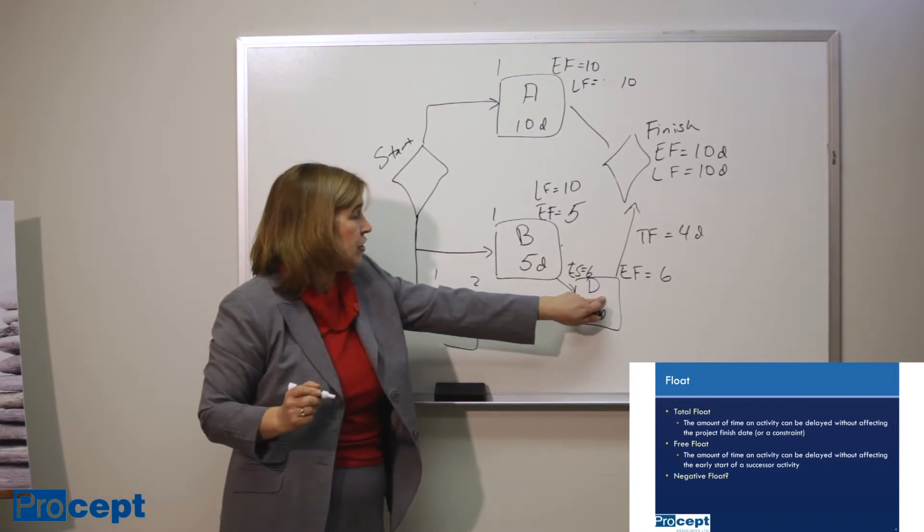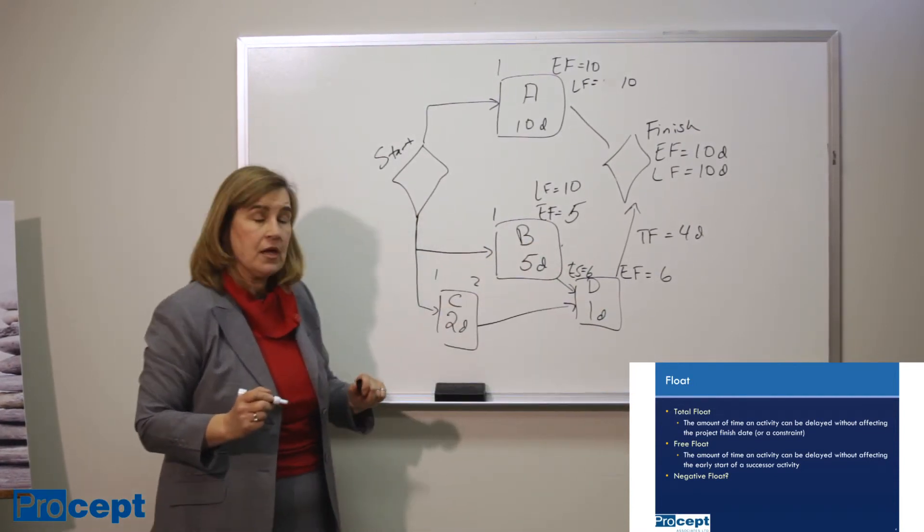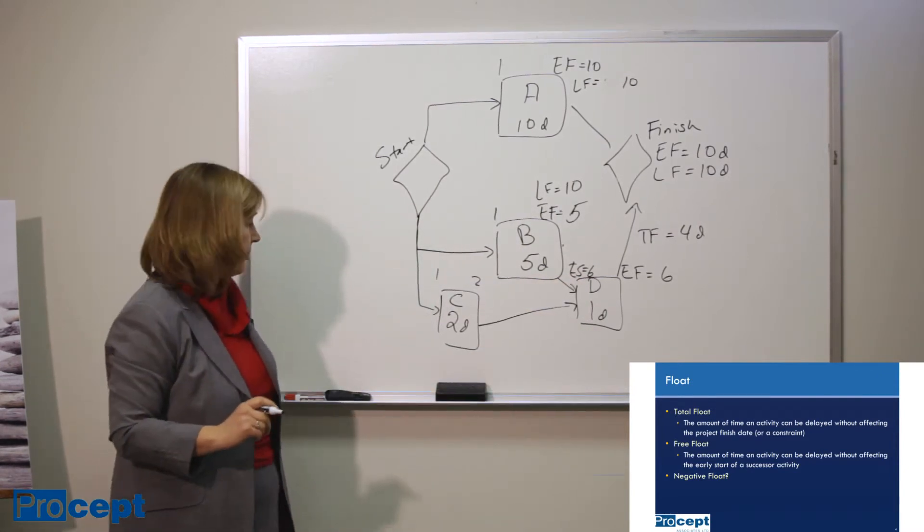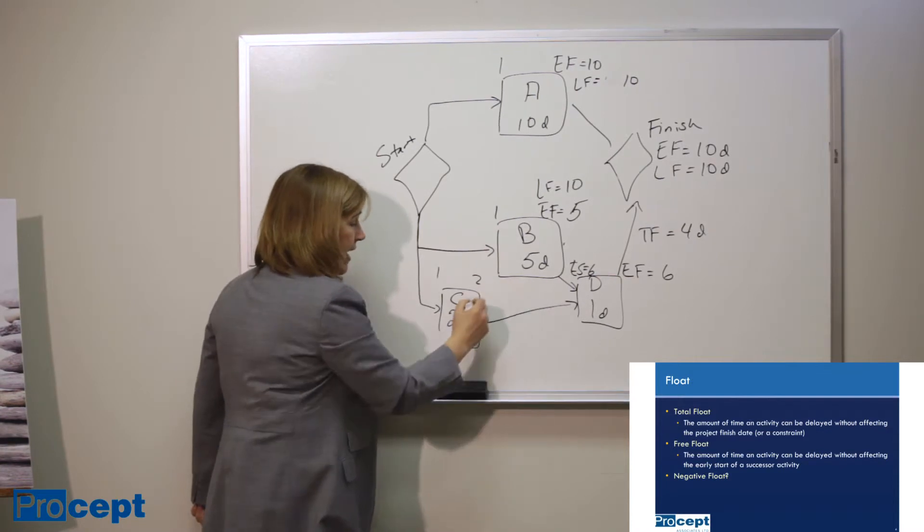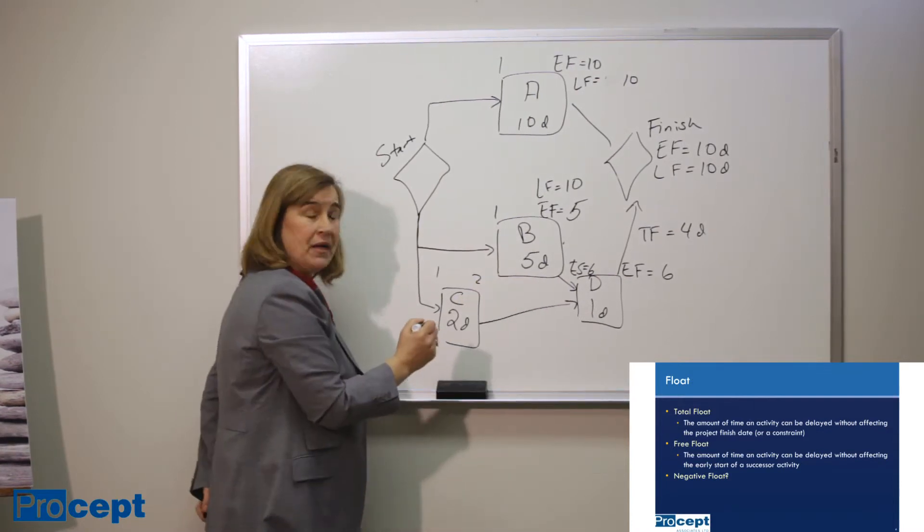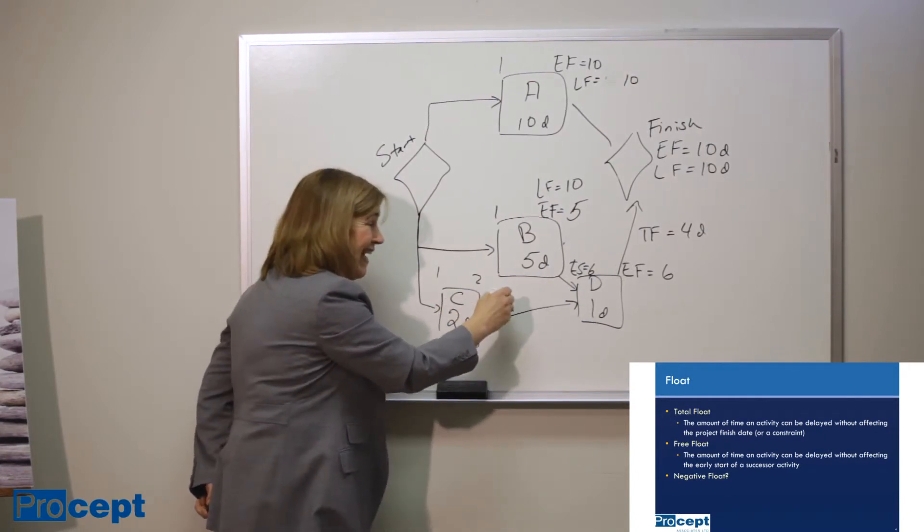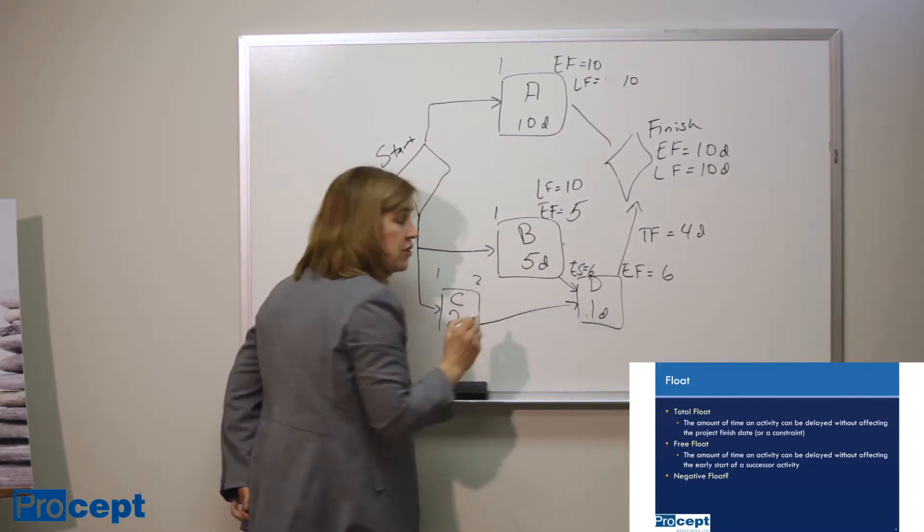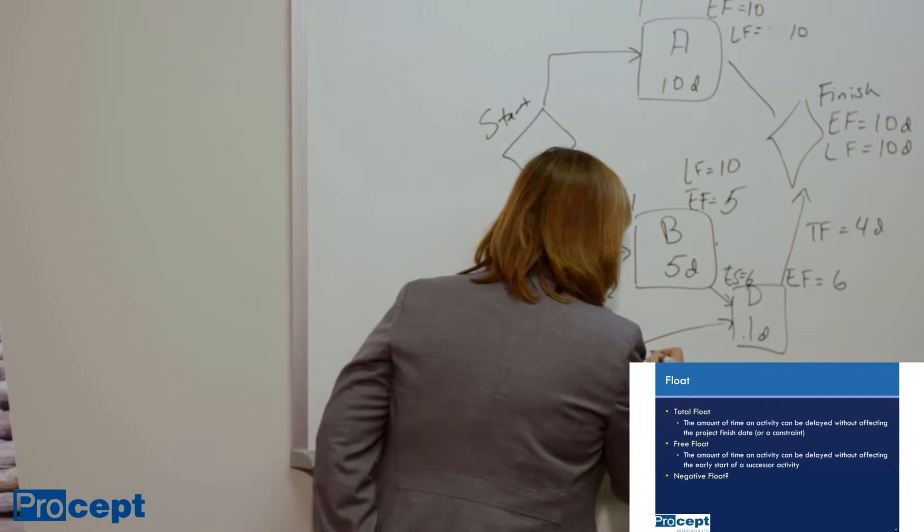Now, D cannot start until both B and C are finished. So the earliest start time for D doesn't change. But you can see that there is a 3 day gap between C and B. In other words, we can delay C up to 3 days without affecting the start time of D. Hence, the definition of free float. The amount of time we can delay an activity before it affects any other activity. That's called free float.